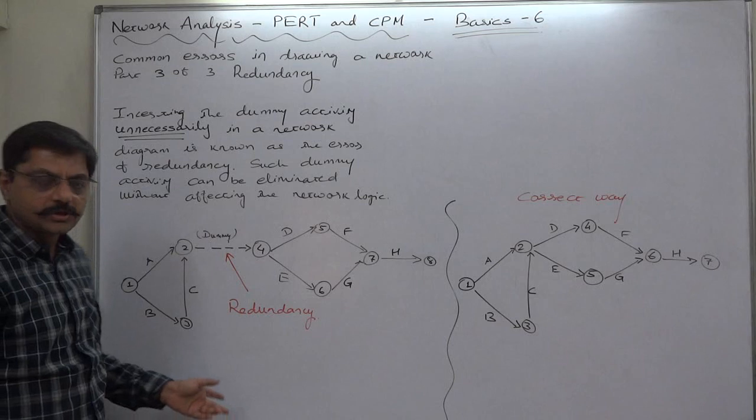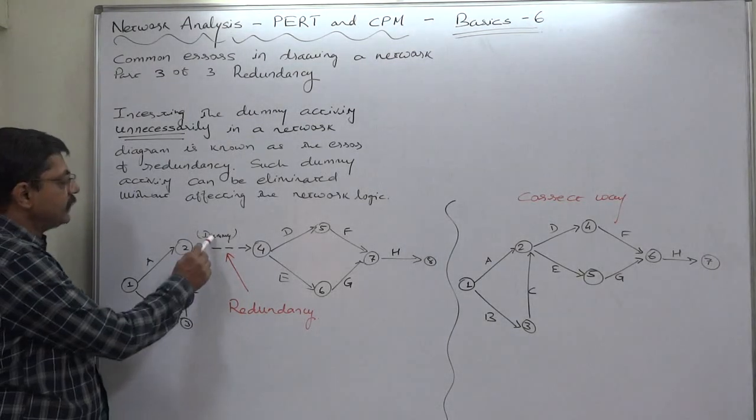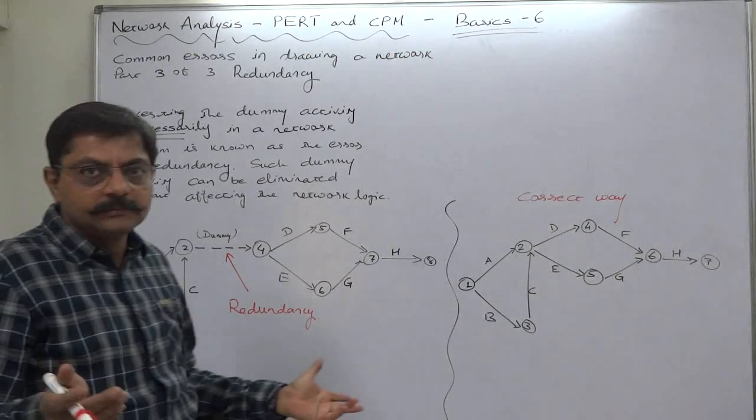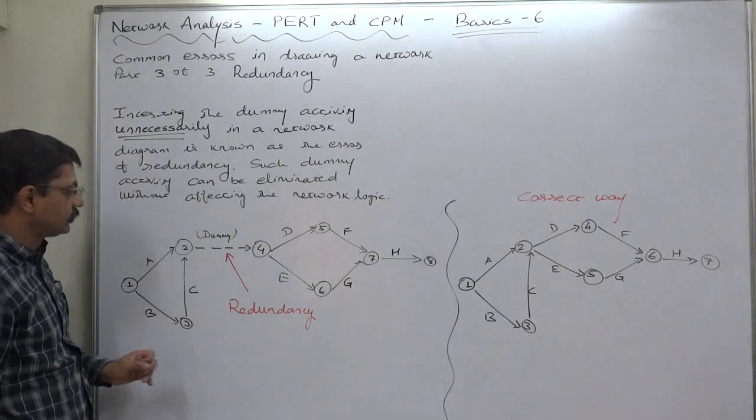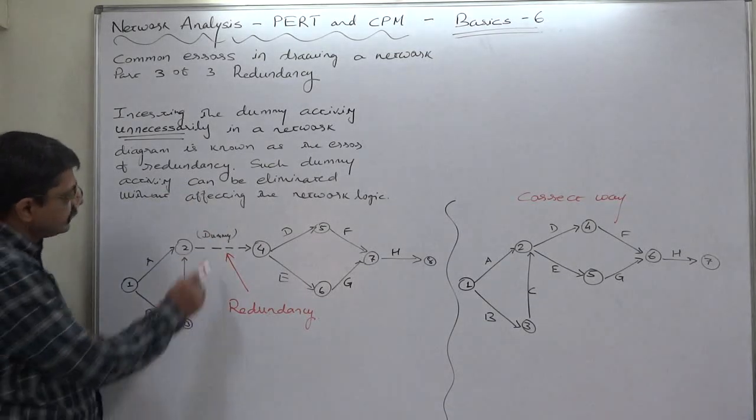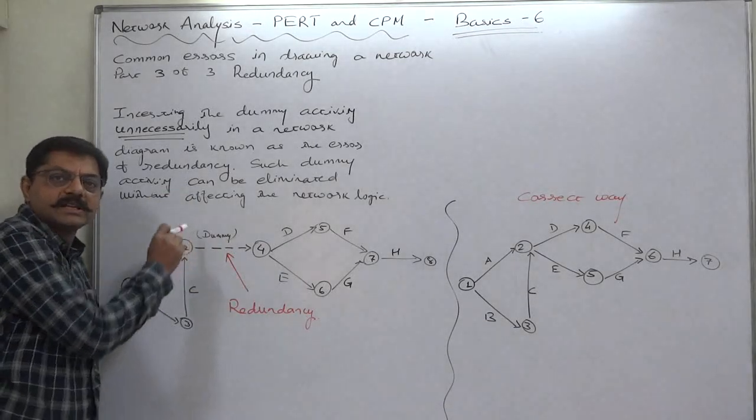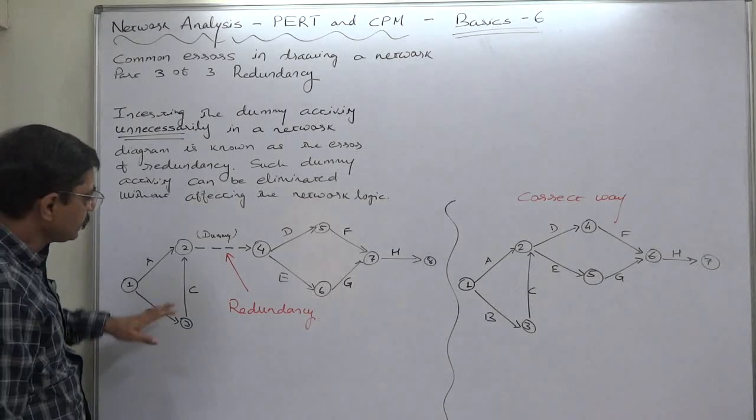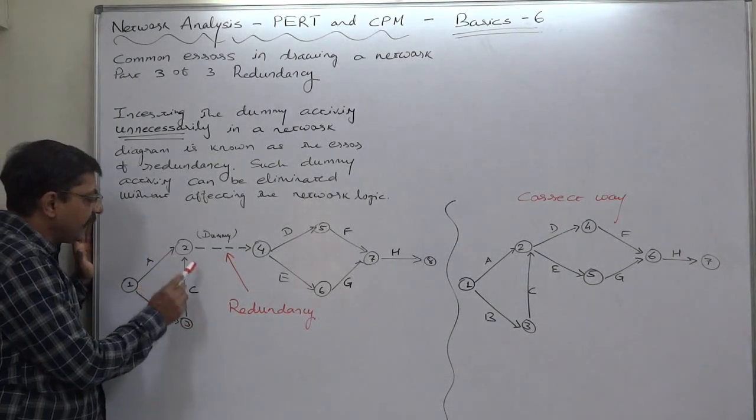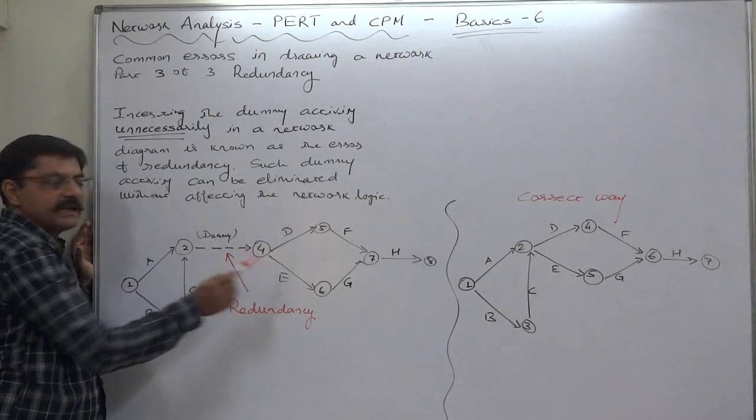The person who has drawn this chart has used dummy, because of the reason only he or she knows. You can easily understand that this dummy is not at all necessary at this place, because ultimately what happens after completing A and C we can start D and E.